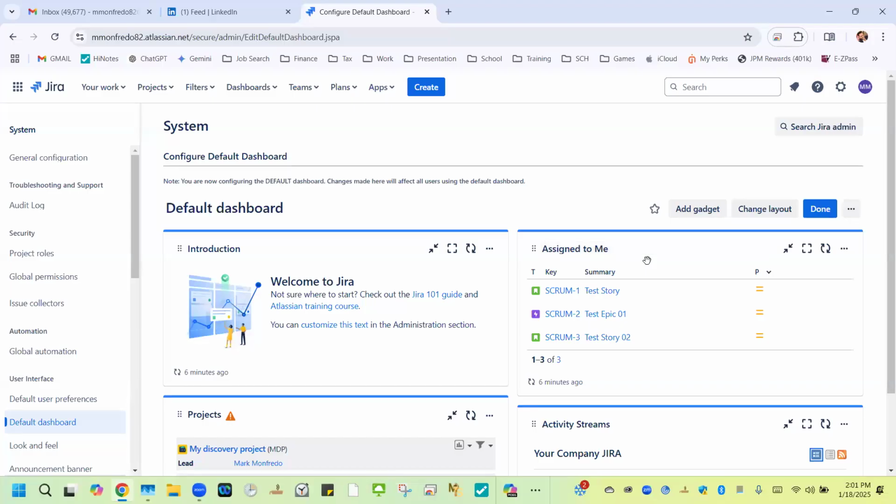So once again, this is the default. There's some really important information here that I want to cover. The first thing you want to do is add this as a star and make this a favorite. The reason is that as the PM, you want to think about how you can create a default dashboard that you can then shift and lift to give to not one team, not 2 teams, but 30, 40, 50 teams. So you set up a default dashboard that they can see as a favorite and then customize however they like.